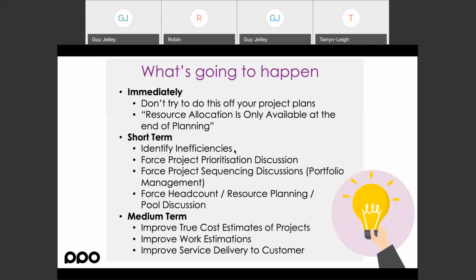Nothing takes 2 hours. So over time, because you've done the allocation and you've actually run the project and seen how long these things take and should take, you start to get a much better view of what the estimations are. And people will start to better estimate, which will only help you going forward in terms of proper resource allocation. If you do timesheets, of course, you can see the actual time spent and you start to see plan versus actual, and then you can really start to deliver some value in terms of how long these activities actually take. Even without the timesheets, just the duration that these things take and the updates on the resource allocation as you're moving, you'll start to get a sense of where the estimations were poor.